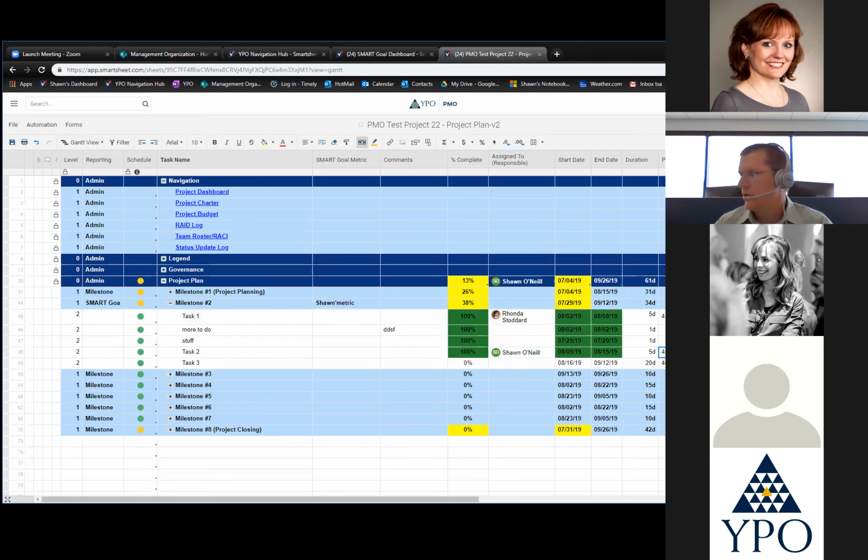When you change the dates on stuff, it'll stay in order. So here, let's say, I'm going to get rid of that one. And let's say that this was actually dependent on 45 and this guy was dependent on 46. So if this guy is dependent on 45, notice over here that it's sitting right here, but we want it to happen after that task and we're going to make it dependent on there.